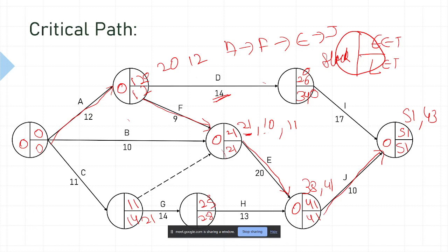Okay. If you have got a critical path and if you delay any activity on this path, the whole project will get delayed. So it is the longest path. Or is it the shortest time in which you can complete the project? Absolutely correct, sir. We never thought about it, but that's a good perspective. I think you can understand the difference, right? One point we are talking about, it's the longest path, and then we are saying that it is the shortest duration in which we can complete the whole project. Yes.